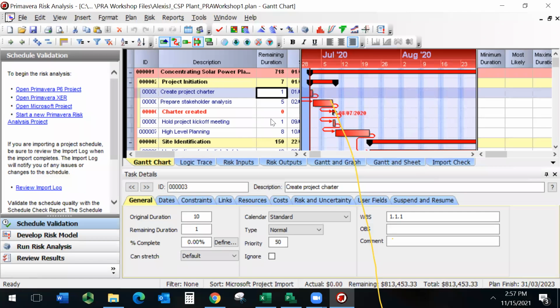The key difference between the 2 is that the triangular distribution will use a simple average to calculate an average estimate, but the beta PERT will use a weighted average, right? So we can do that depending on what works for your project.